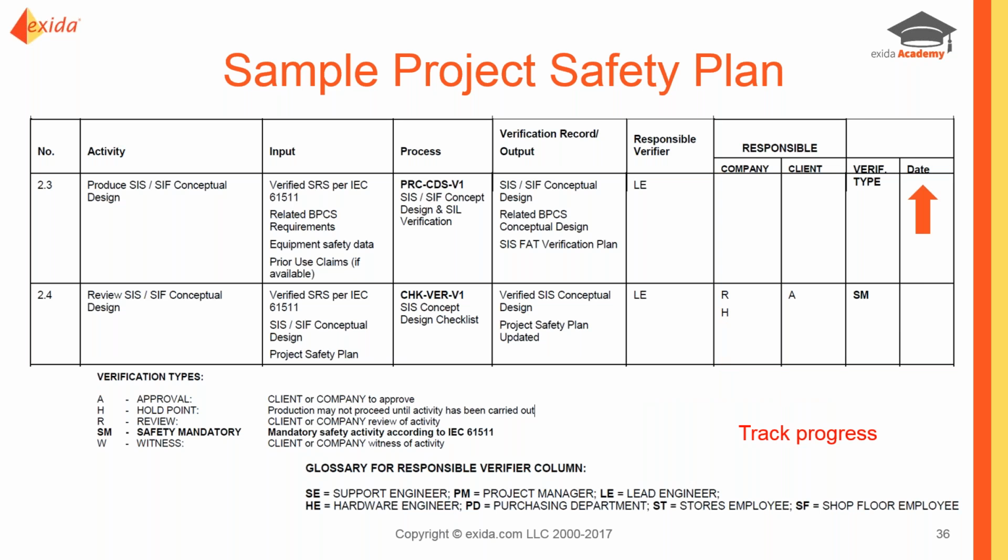And then we have a mechanism also, once we have a project-specific safety plan, to follow the dates of those verifications and look at the status. This template should include entries for all required activities, but it needs to be flexible enough to coordinate those responsibilities and scopes for multiple responsible parties, as you might have in a large project with multiple contractors and subcontractors.